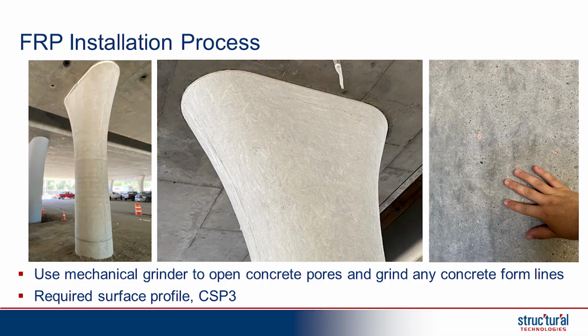It got the work started quicker and, again, eliminated the need of 3 boom lifts at X amount of dollars per day, which is going into the bid. We're cutting costs down there. Now, I have been in a variety of commercial construction applications over many years. Prep is generally essential, and prep should not be shorted. The better your prep, generally the better your outcome.